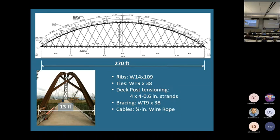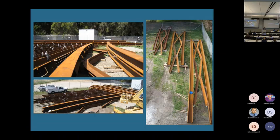And the other thing is I'm interested in the logistics piece. So Stinger's in Arizona, and these all ship on trucks nicely, right? For us, we really like to figure that out: where are the splices? Everything's got to be over the road shippable, nothing more than 65 feet. And then you assemble it at the site and then just pick the pieces up.